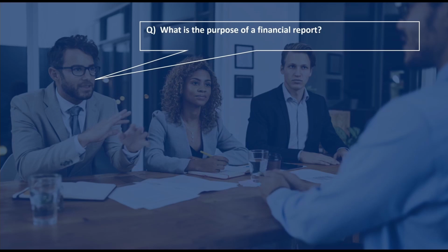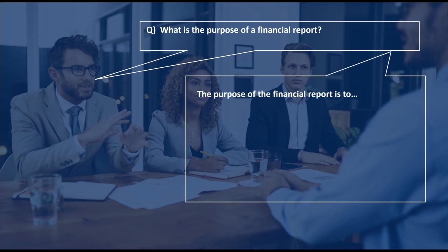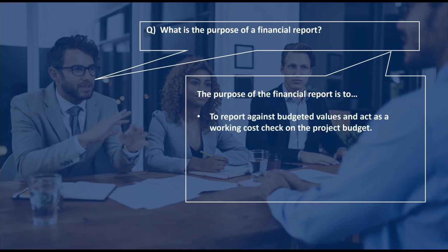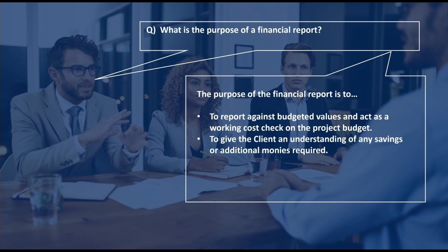We may also receive another question checking our understanding of the purpose of a financial report. And to address this, we can say that this is to report against budgeted values and to act as a working cost check on the project budget, to give the client an understanding of any savings or additional monies required.